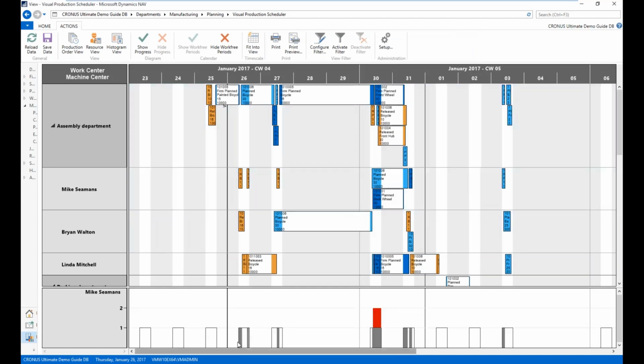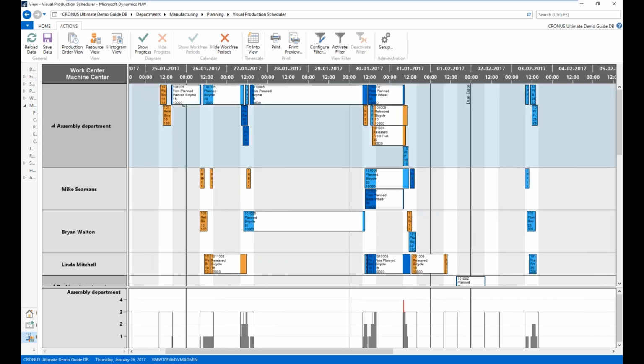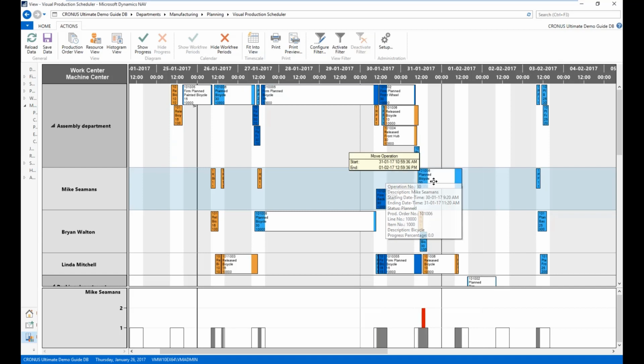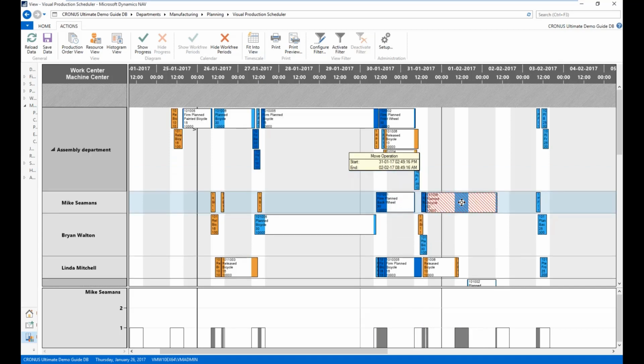And I can see how much of that capacity is used at any given time. And I can see, for example, when there is overage or too much work assigned to Mike. This is really your view where you can very nicely take items and say, as a scheduler, as a planner, I have a couple of options here. I can move something to a later point in the schedule, but now you see when I do this, it actually makes it late. So even though I'm in the resource view, I still see the impact of timing around my movements.